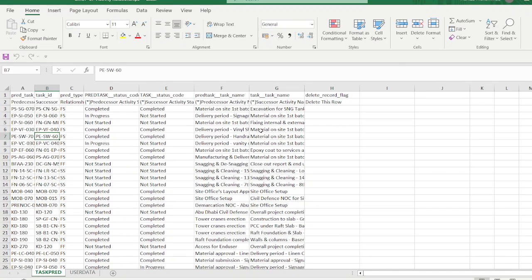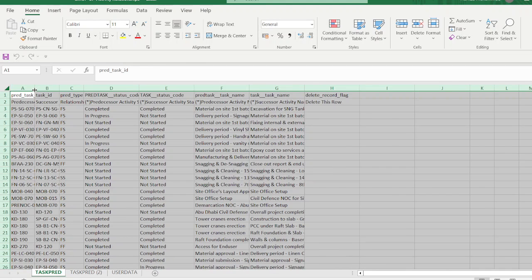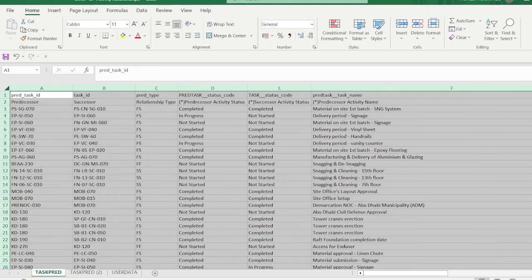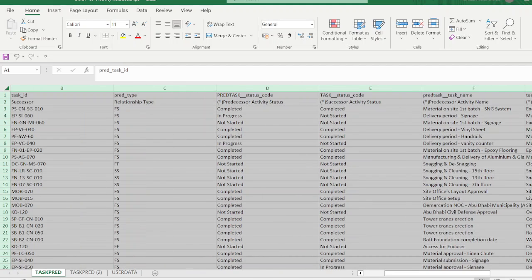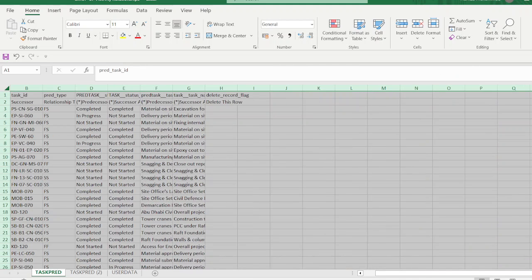I already made a template for out-of-sequence activities. In this template you need: predecessor, successor, relationship type, predecessor and successor activity status, and their names. No other fields are needed — keep the file light with only the necessary data. Press OK, go Next, define the location where you want to save the file, press Next. The export was successful. Let's open the exported file.